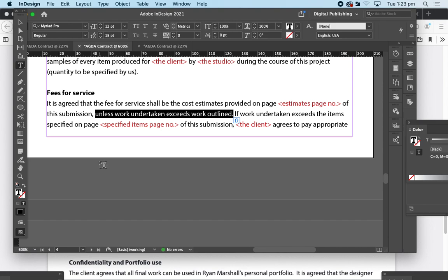Wasn't in the contract. So you go back to them with an email and say, yes, that's fine. Just letting you know, that's outside of the contract work, so that would be charged on the invoice as excess work. So when you do your invoice, there'll be another item you'll put in which just says excess work. So you'll have item one, which, you know, stage one of it, stage two, all the different things you're charging them for that you agreed to in the contract, and then an excess work one, which is web banner.